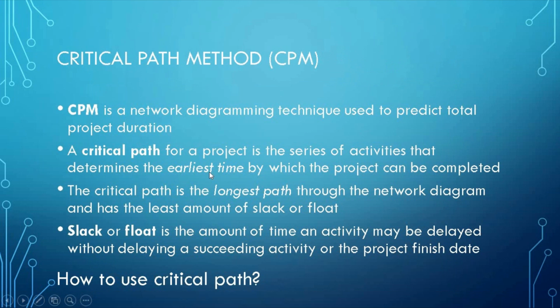Method. It helps you to plan all tasks that must be completed as part of a project. A further benefit of critical path analysis is that it helps you to identify the minimum length of time needed to complete a project. Where you need to run an accelerated project, it helps you to identify which project steps you should accelerate to complete the project within the available time.